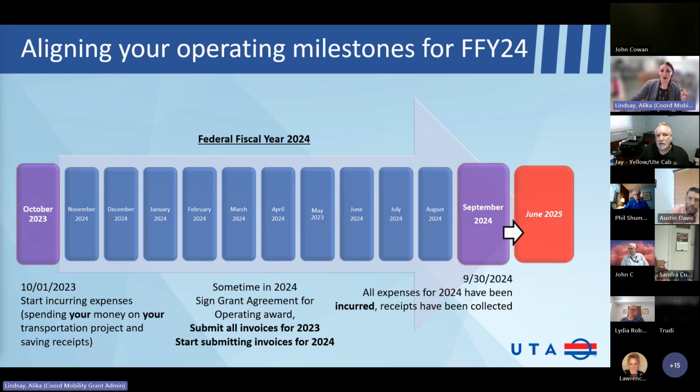Our goal is usually to get vehicles ordered before the end of the year, because then we usually get them fulfilled quicker. Vehicle vendors tell us if we get in line before the next January 1st orders, we can usually get vehicles quicker. With Lewis Bus now being a state approved contractor, we're hoping to get vehicles a lot faster.